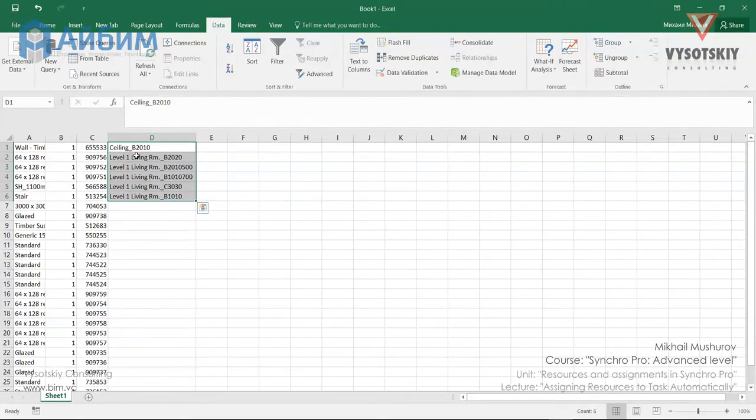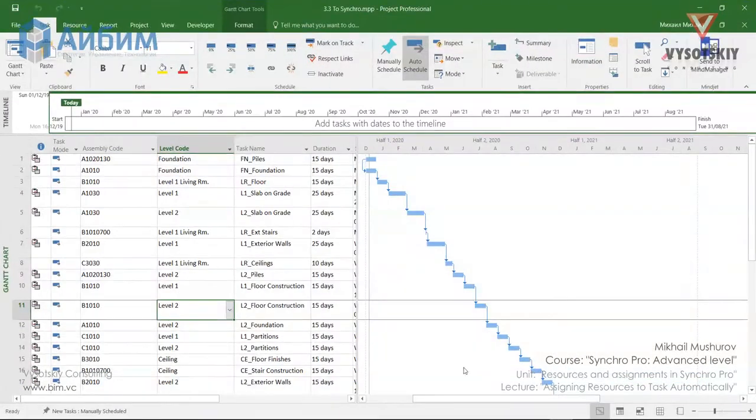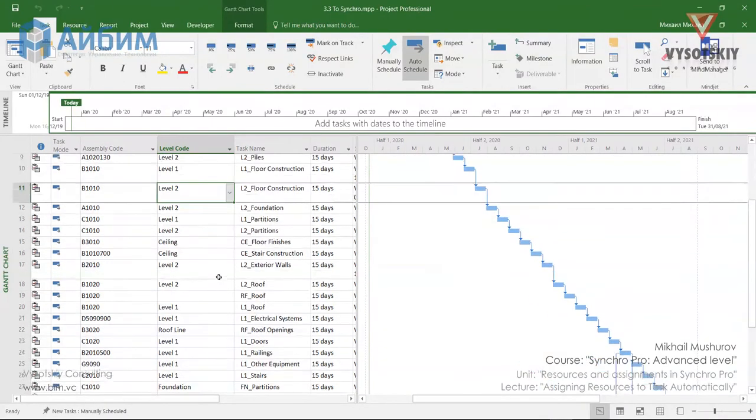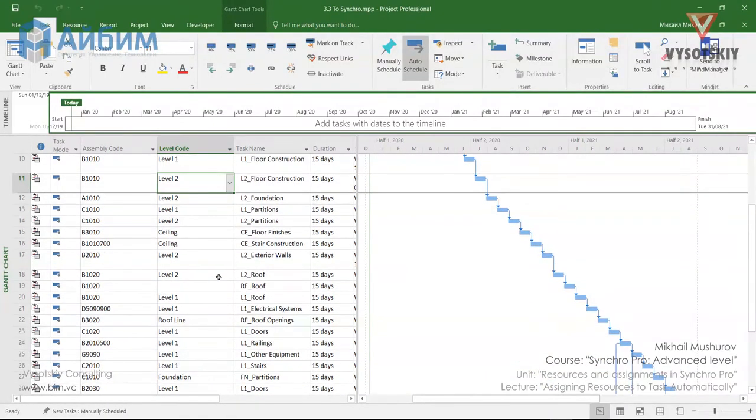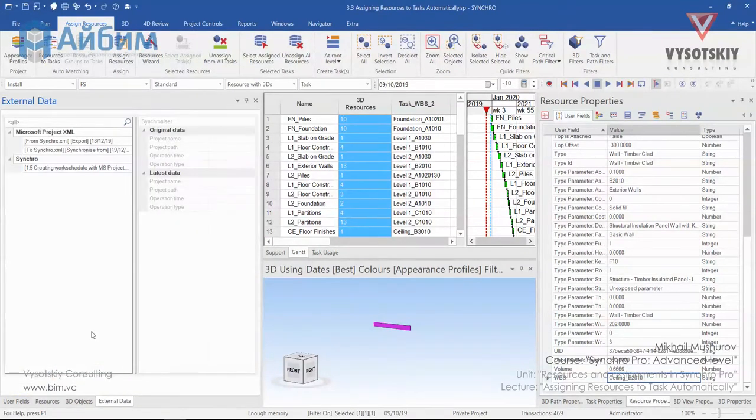So let's assume that our planning engineer updated our schedule and sent us an XML file. So we need to go to Synchro and Synchronize it from. Click over External data.